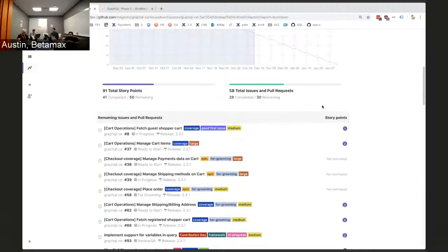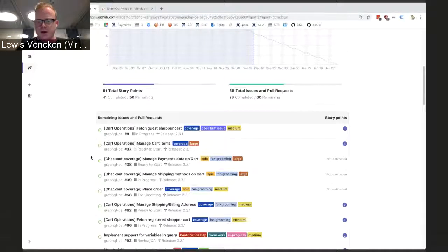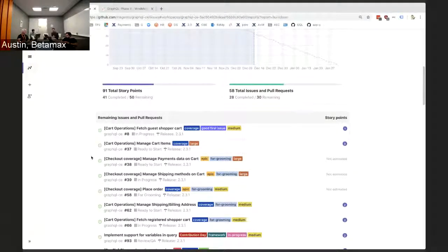One more question. Absolutely. Go ahead. Story points, are they an estimation of how many hours you think you need, or is it more the difficulty level? It's more a reflection of basically relative size to other stories. We don't translate them directly to an amount of time because that's kind of dangerous, and it really makes the picture very unclear.